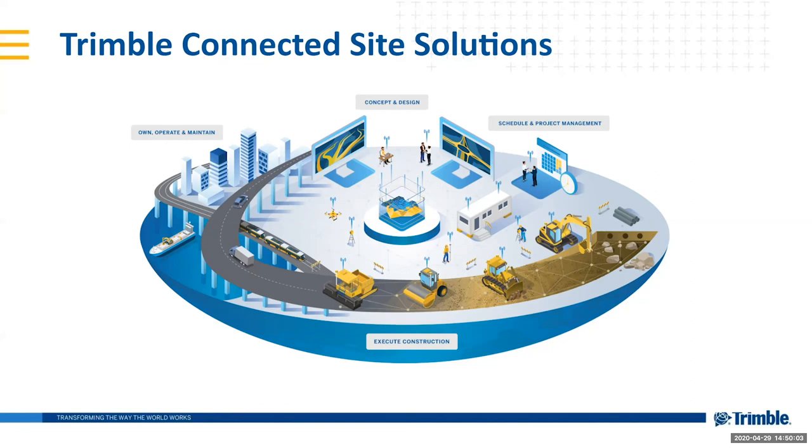and our Earthworks progress template will have three measurements. It will show you the latest survey compared to the previous survey, cut and fill on that. It will show you the latest survey compared to the latest design file, and show you cut and fill to the latest design file. And then basically a burn down chart for the progress, showing you across your surveys how you're trending towards hitting the design. So that's a burn down chart that tends towards zero.